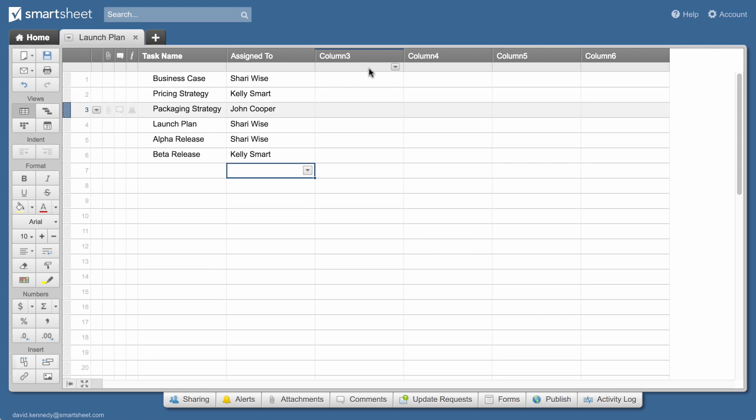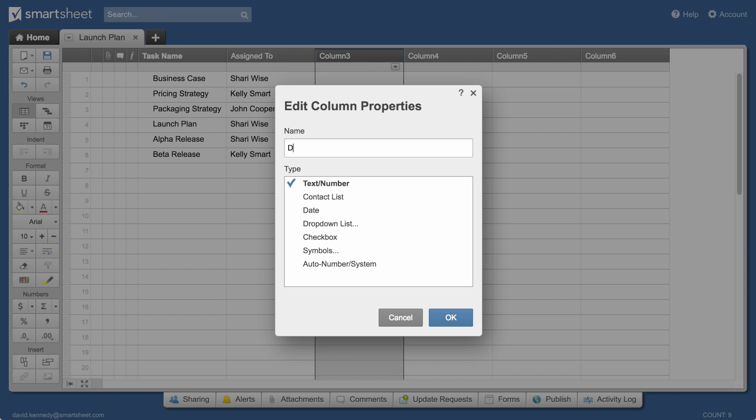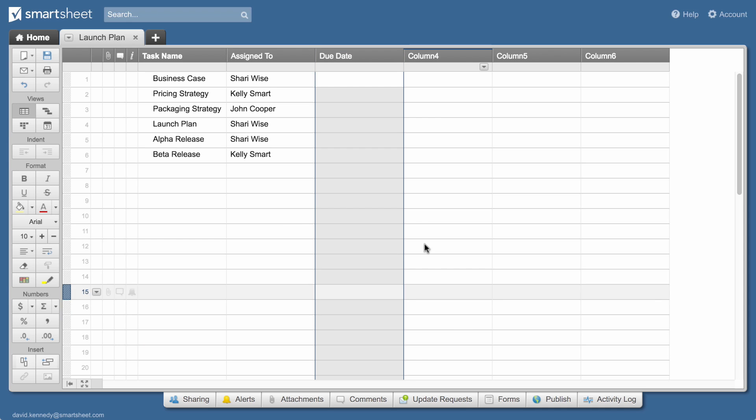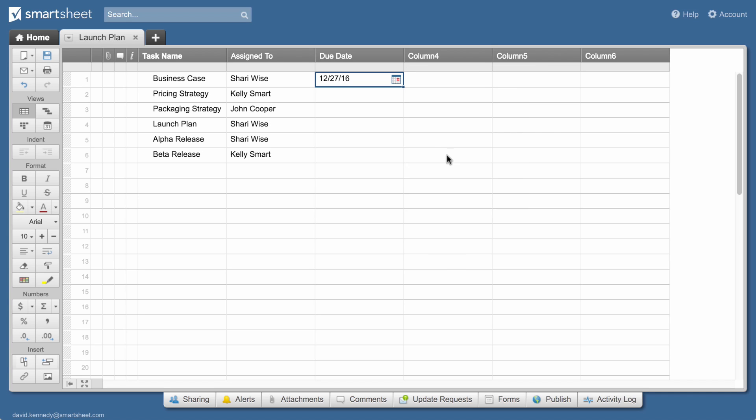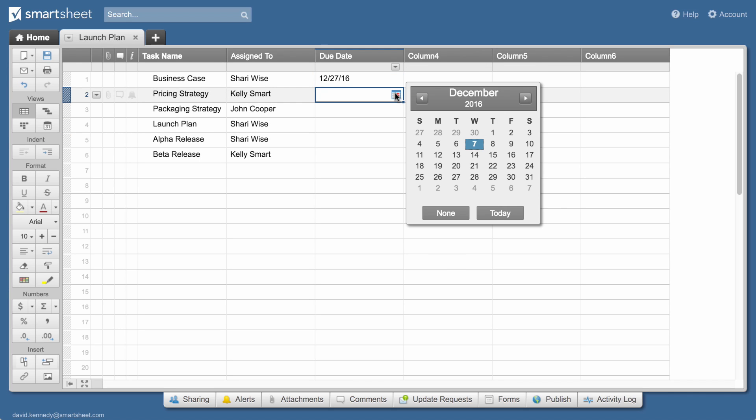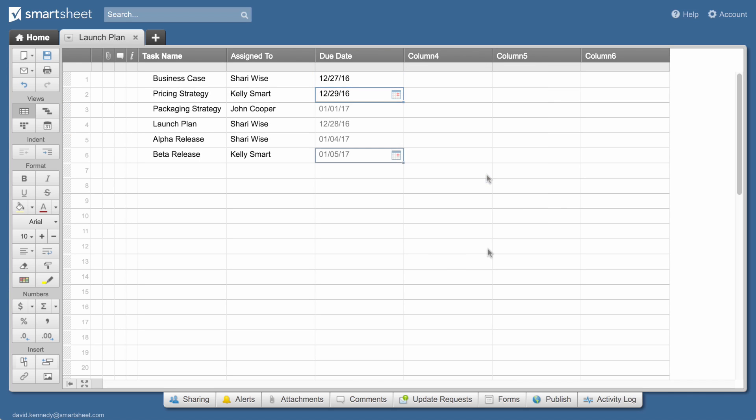We'll name the next column due date, give it date properties, and select due dates for each task from the calendar. Adding dates to your sheet makes it easy to create automatic reminders for team members and view dates from your sheet on a calendar.